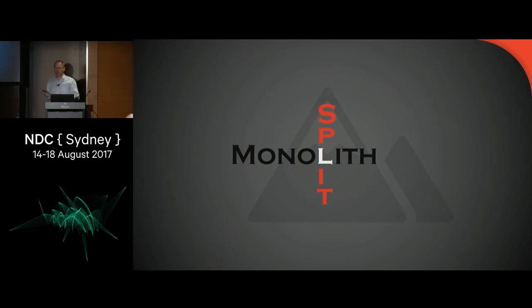We broke our code up into 6 or 7 groups, components that encapsulated several services that were logically deployed together. We did just enough, and to some extent, we hid the cost of doing this from our product owners, where we would say every sprint, every developer was spending 2 or 3 days doing a deployment and validation and testing. So of all the manual steps, that adds up to 12 or 18 days per sprint of manual work. We figured over 2 sprints, we could probably use that time to fully automate our build. And that's why we cut it down to 2 sprints.